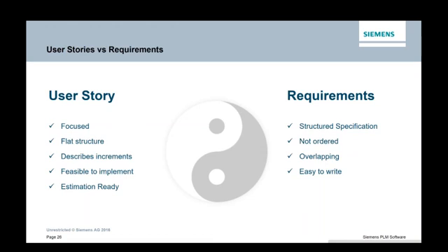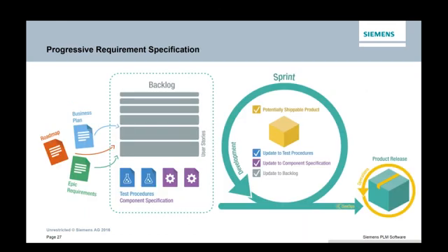So in reality, you need to develop the backlog of user stories or backlog of work packages, and as an input, you might get some business documents, but you also get these epic requirement specification documents, and you again have a traceability from the requirements into the user stories or work packages. So at the end, you want to ensure that everything you gather at the beginning is somehow covered by the user stories. But at the same time, if you really speak about those complex software projects with millions of lines of code, we see that you need to also have the component specification documents.